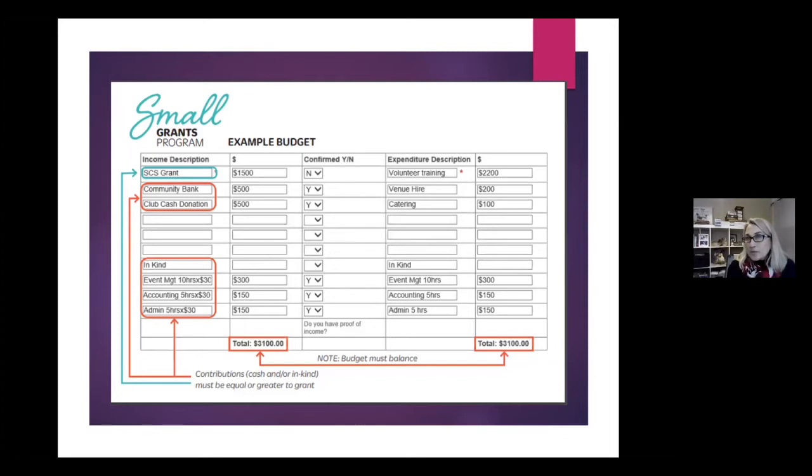After it's been awarded. If it's going to change beforehand, you need to let the funder know, because it's no longer an application that might be valid. However, once an application is awarded and you've been successful, that's the time before you sign an agreement of any type. It is much easier to change the scope of your grant with the funder and tweak it before the agreement is signed. Once an agreement is signed, it's far harder to get your own way and change anything. So yes, definitely do it before you sign an agreement, in between being awarded and signing the agreement.